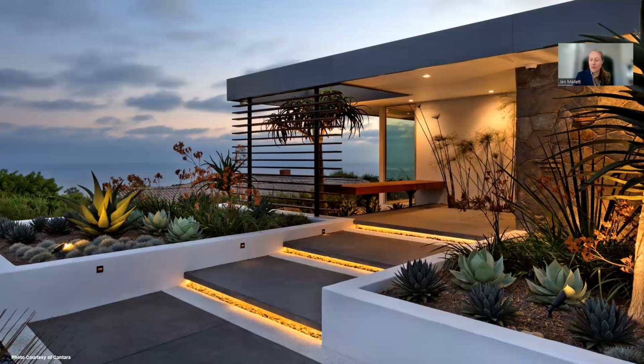So they have taken the time through proper design and part of the construction process too. The steps, for example, the ability to light the steps underneath like that and provide that really nice warm color tone. That happens through really great design planning, right? So there's coordination that needs to happen with a general contractor. If there's a mason on it, the masonry work, understanding how that's going to happen with the timing of the steps, where it's wired back to. So working with, maybe, an electrician that's part of that project, making sure that it's centrally located within the other electrical loads.